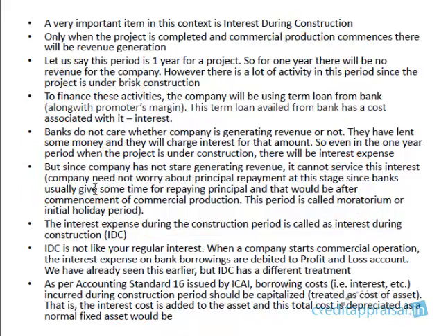Usually banks won't finance this IDC. But some banks have a policy of financing up to 50%. Again, this varies from bank to bank. So usually IDC is met by the promoters. Usually 100% margin is stipulated by the banks. Okay. A bit of advanced topic, interest during construction. Just understand the concept. It is the interest expense. Okay. It is the interest expense during the construction period. If you understand this, that is more than enough.